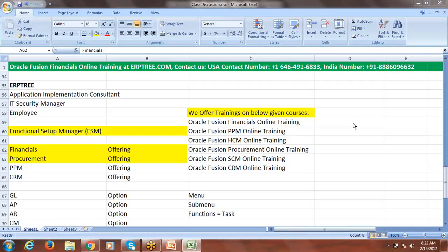That option is not available. The system will trace how many tasks we have in the project. Say 2000 tasks, and 1000 tasks are completed. Directly it will take 50% as completed. There is no parameter where you can pass 5%, 2%, 1%. Generally that is not required, that's the reason we don't have that option. Somewhere it may be required, but we don't have the option. That is the conclusion. Any other questions?